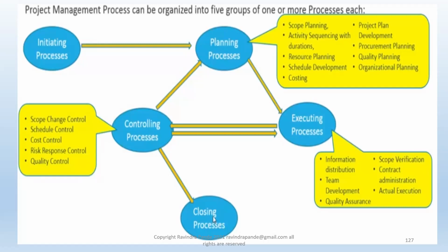And this way we normally plan this procurement proactively, so that I'll receive the instrument before the actual planned task, at least a day before the planned task. Again, this depends on the perishability of your instrument. As far as biometric is considered, we don't have to worry about perishability, because the aging of that instrument is quite negligible even over the years, and so on and so forth.